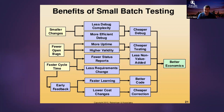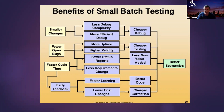Smaller batches give us faster cycle time, which is huge — not only does it make more money, but having faster cycle time means frequent, accurate, and actionable feedback. That's how we stay as safe as possible in the complex world. Faster cycle time means fewer requirements changes over time, so the cost of change is low.